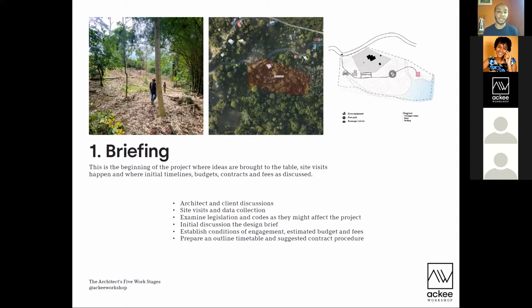So we'll start with the briefing stage. The briefing stage is pretty much the initial engagement between the architect and the client. Maybe the client comes to the architect to propose a project. Maybe I have a piece of land in Santa Cruz and I want to build a medical facility on that land. So the architect and the client start to discuss the mission, the goal, the objective of the project, start to briefly or kind of vaguely discuss timelines, get a sense of budget, the fees for the architect versus the fees for the construction,